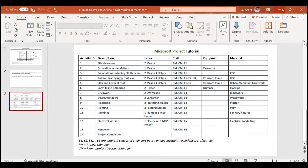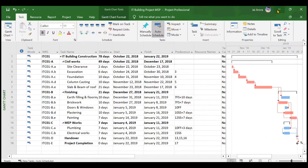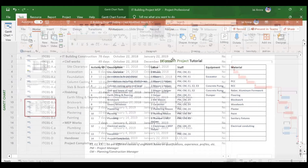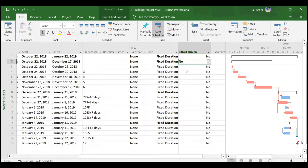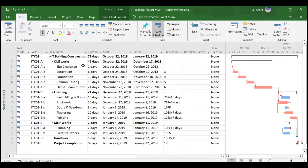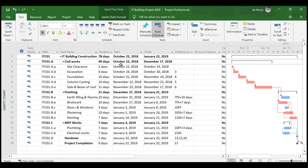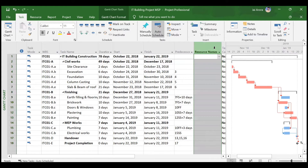As shown in the PPT, the project manager and construction manager are common to every activity. Instead of assigning them to each activity individually — which would cause duplication — it is always better to assign common resources to the main summary task, which is 'IT Building Construction.' So the first method we are choosing is to add the resource name column.